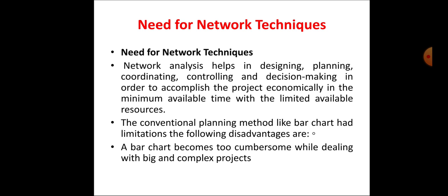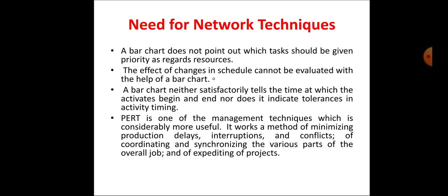What is required? The conventional planning method like the bar chart had the following disadvantages. The bar chart becomes too cumbersome while dealing with big and complex projects. In the bar chart you show that within this time, this much of the project is completed, this many days, and so on. A bar chart does not point out which task should be given priority with regard to resources.